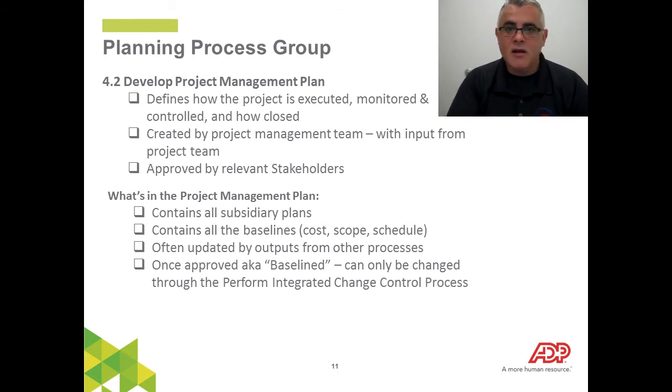Another key point here is if you are someone who's invited to take over a project that's already begun, it's always important that you go back and you review the project management plan. You want to make sure that the project management plan is still valid and understand where they've been, where they're going, and where you're going to take it next. So if you take over a project, always check the project management plan.